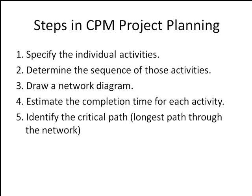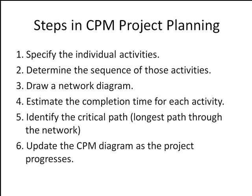Because of its impact on the entire project, critical path analysis is an important aspect of project planning. Finally, update the critical path method diagram as the project progresses. As the project progresses, actual task completion times will be recorded and the network diagram updated. A new critical path may emerge and structural changes may be made in the network if the project requirements change.